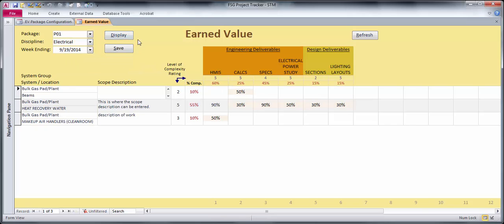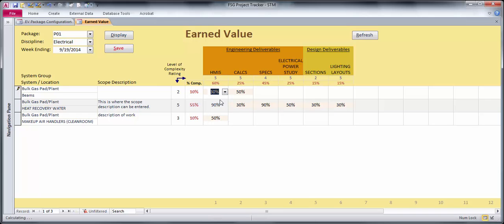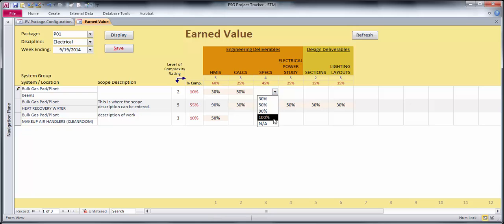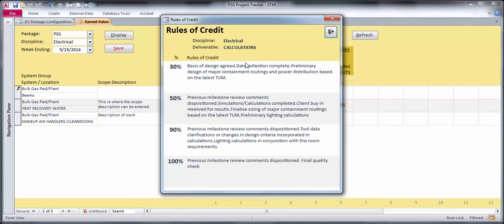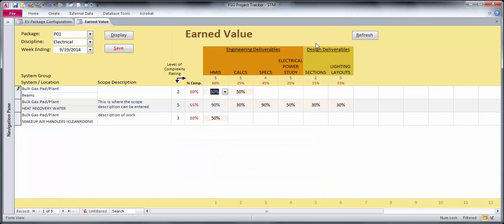So when you make any changes to the percentages you have a drop-down to pick, and they only wanted to be able to select these four percentages - they don't want people gaming the system by just bumping up their percentage each week. And actually each percentage has a rule of credit, so if they say that they're at 30% on this type of task, I can double-click here and it says the work that they should have actually gotten done in order to declare that they have that percentage of work done.